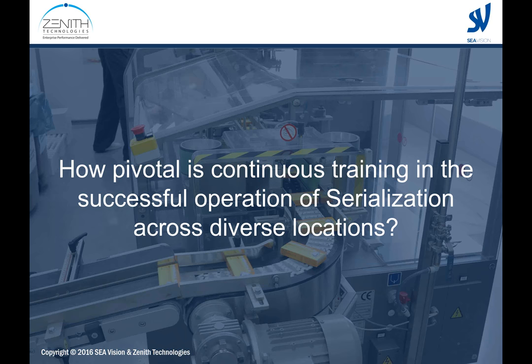I mean, the benefits there are measurable for your support teams, for your ways of working, and in fact what we've found also for our OEE and the hit that a packaging line might take for having these updates and started serialization. In fact, we've seen OEE go up and improve beyond what it was originally before the project started, because we are training out best practice on how to use the systems and the equipment.